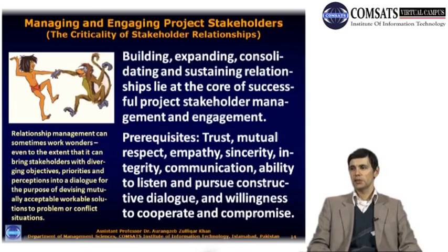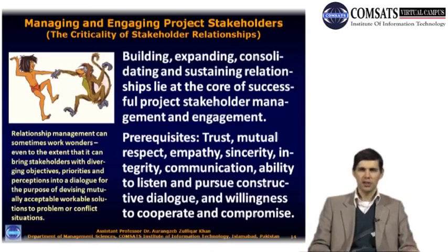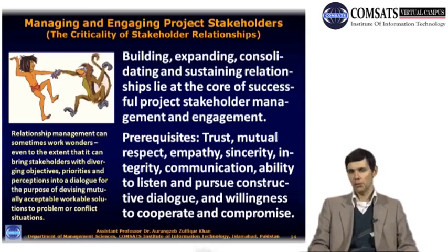In project management, when you're doing projects, sometimes you might have to compromise with your stakeholders. You say, okay, well, we understand what we are doing is going to maybe cause you or your environment a lot of damage. We will look at an alternative way. We will redesign our project, for instance, or we will reconfigure it in such a manner as it will both benefit us as project developers, and it will also benefit you as project stakeholders.